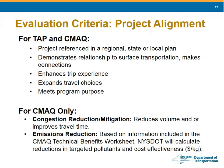The next criteria — project alignment — will contribute another 20% of your project score. A project is well aligned if it's referenced in a regional, state, or local plan, such as a comprehensive or master plan, corridor plan, byway plan, Americans with Disabilities Act (ADA) transition plan, an MPO plan, a plan from your regional economic development council, or if it has a relationship to a designated bicycle route, or a local smart growth or complete streets plan.